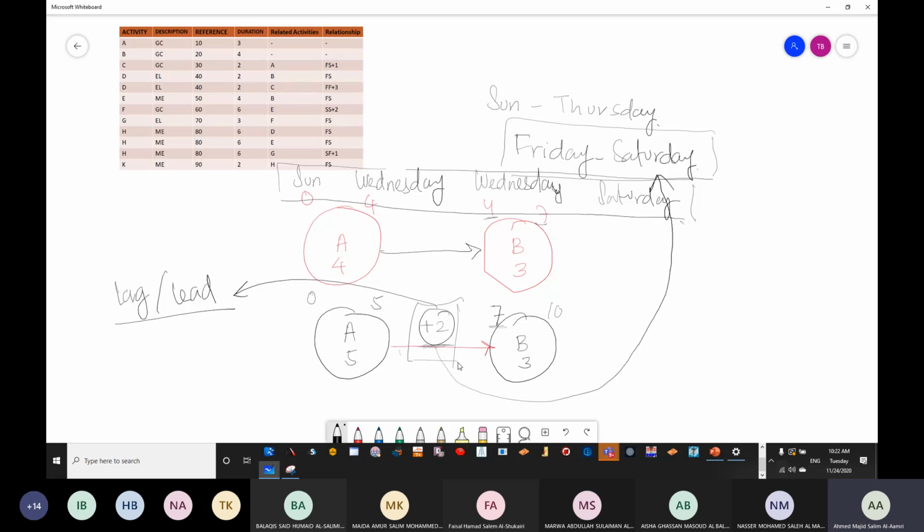So I'm assuming in my plan, 7 days are working, but actually, in reality, I'm working only 5 days in a week. It means instead of finishing 7 days of work, I'm finishing only 5 days of work, and that means you are going to be late. You are not going to finish in the correct planned time. Is it clear?